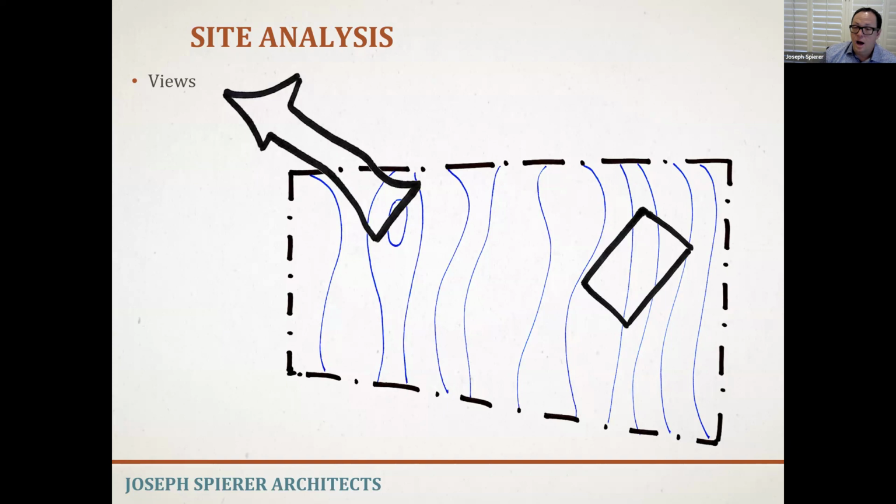Now, in order to get 100% assurance that you can do what you want to do, you actually have to go through the permitting process, right? So you have to get planning approval and HOA approval and city approval, and that cannot be done during an escrow. And you're never 100% sure until you can put your shovel in the ground, but we can bring people from a 30% assurance that they can do what they want to do to about an 85% assurance, which usually gives people the peace of mind to be able to move forward.